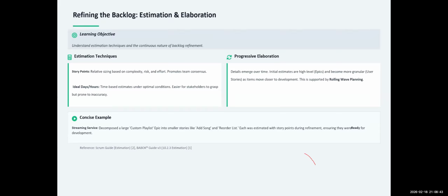If you have the Scrum guide, it tells you how to put story points, where you have extra large, we are using shirt sizes. So this work is extra large. This one is a small t-shirt and all of that, right? So the estimation techniques give you understanding. You're basically trying to refine what you have there, getting more information that helps you to determine the priority, right?